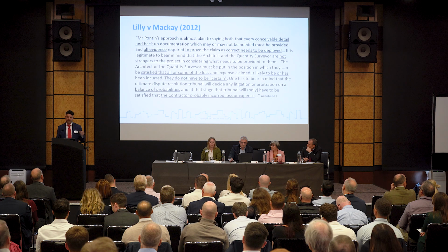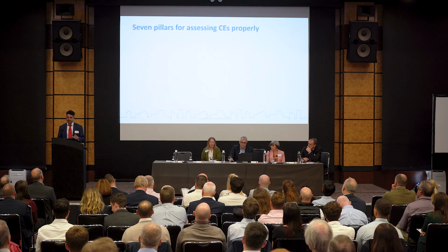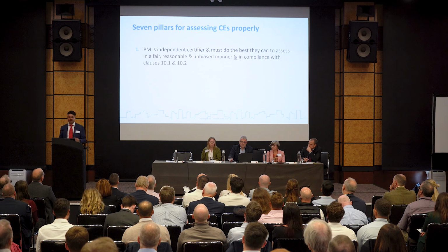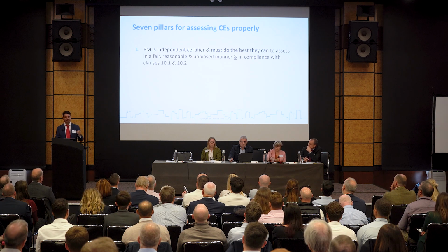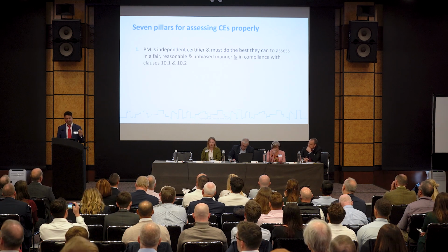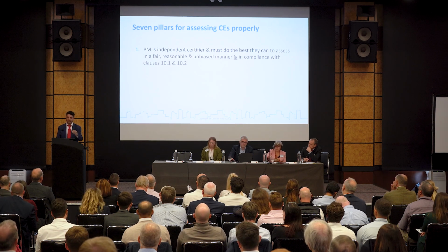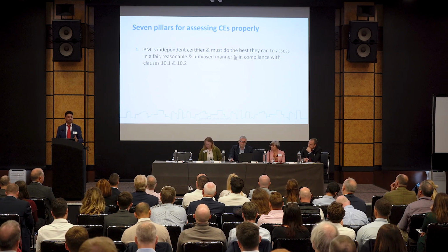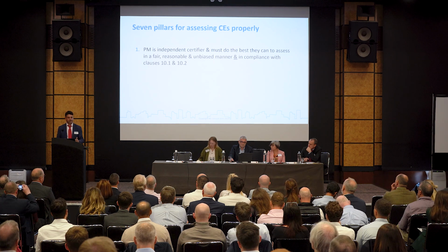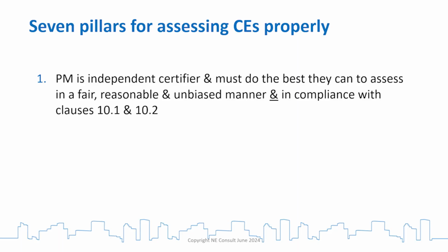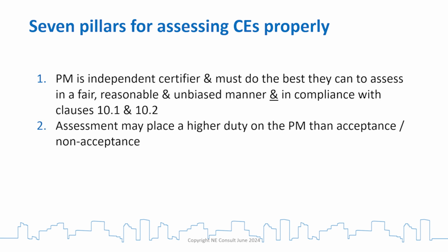So, taking from that my 7 pillars: the PM as independent certifier must do the best they can to produce a fair and reasonable assessment in an unbiased manner, as well as in compliance with 10.1 and 10.2. So this is not a fudge, this is overlaying what's already there. It's imposing a higher duty, I think. Second one is, it may impose a higher duty.